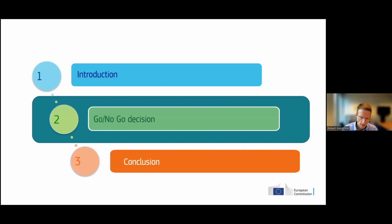The first problem we have experienced with some proposals that we have turned into projects has been related to what has been put in the proposal. We found this certainly in one big case, for example, that a power takeoff cable, which was claimed to be in place in the proposal, wasn't actually in place in reality. I mention that because I think it gives you an idea that this is a type of problem that we haven't had in other sectors.